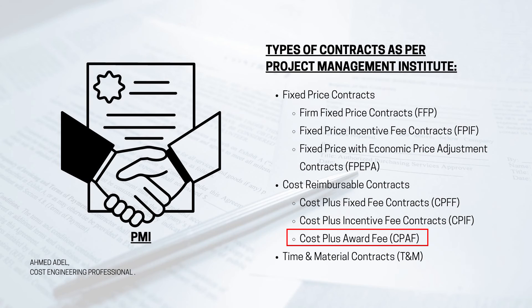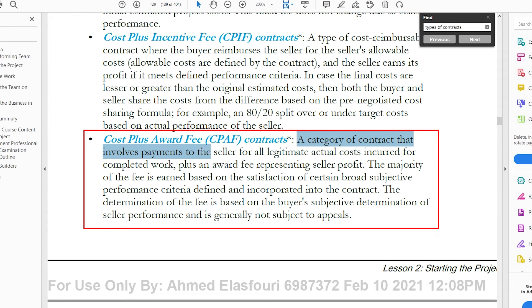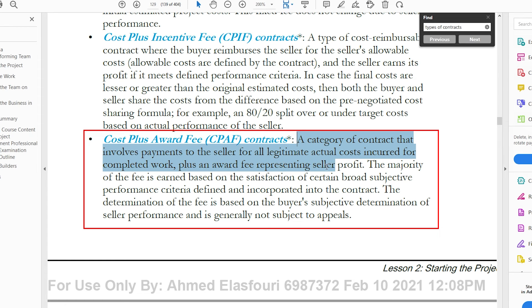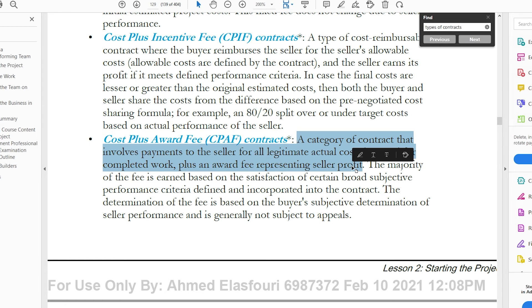Cost Plus Award Fee is the third cost reimbursable subtype. The book describes it as payment for legitimate actual costs incurred — direct and indirect — plus an award fee representing the seller's profit. It appears similar to Cost Plus Incentive Fee. The speaker notes having heard it is used in entertainment-related work but has not personally encountered this contract type.